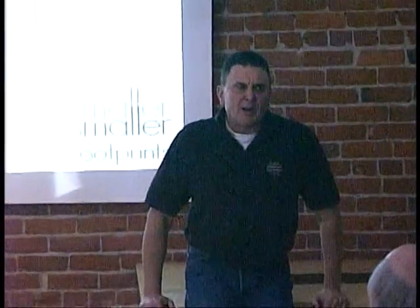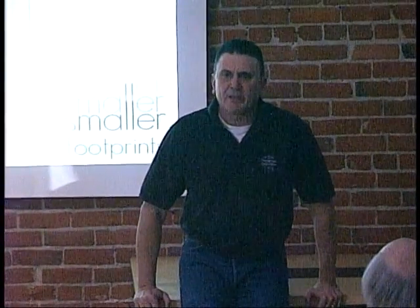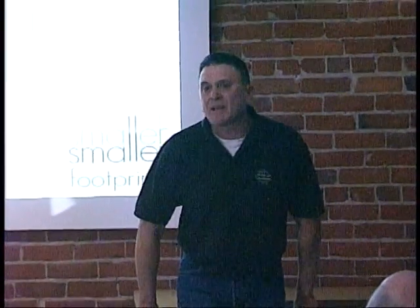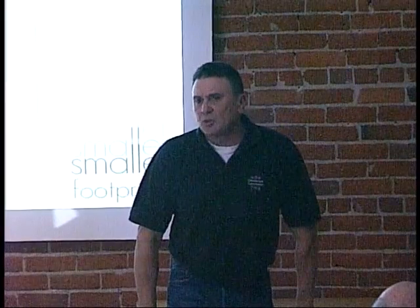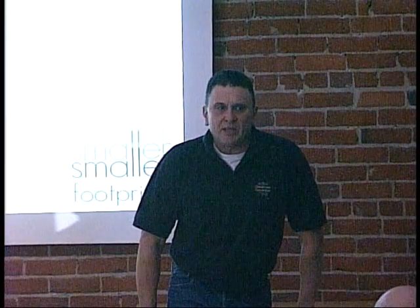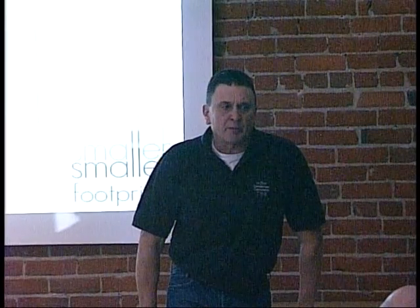I see one thing about the commissioning agent. The commissioning agent is a rough job. You come in after the fact, and you're supposed to magically make things okay. That's not the way a commissioning agent is supposed to be. The report came in at the end, and by then it was almost too late. If he's not part of the process from the very beginning, I don't see how he can do his job effectively.